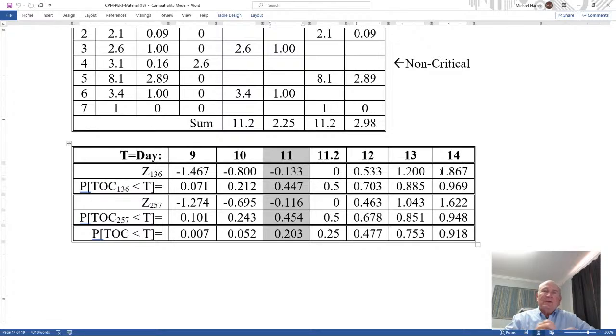So if you have a lower probability of being early, you'll have a higher probability of being late, right? Okay, and bingo, projects have uncertainty. They all have uncertainty. And so the probability of being early or late is important when you have parallel paths. And the larger the project, the very high the probability you will have parallel paths in your critical path. So this kind of analysis becomes very important. Now, the analysis really requires network theory and probability theory modeling, but as a business person, just recognize that it happens and ask the right questions.